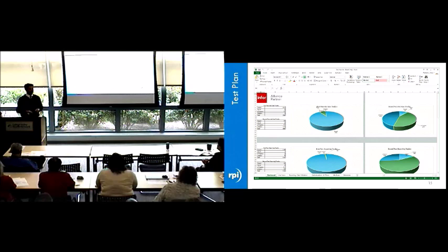And our second pass test, since we know it's going to be a little more intense, we're going to schedule 6 weeks for that, because we have to share the folks that are doing that data validation with their day jobs. So a test plan is scheduling people at appropriate times to achieve outcomes. And a test plan is something like this to track all that and give everyone visibility into your percent complete.